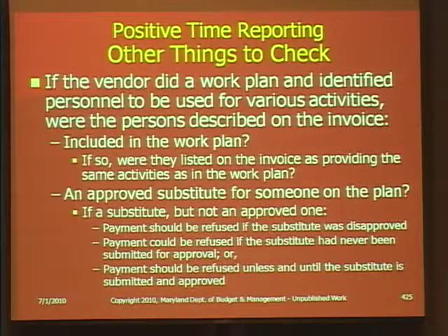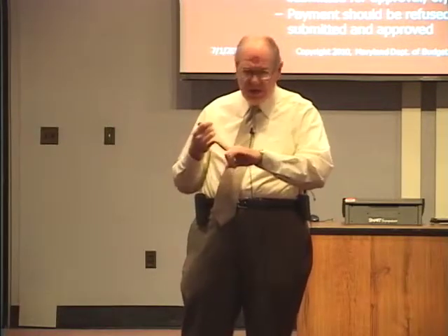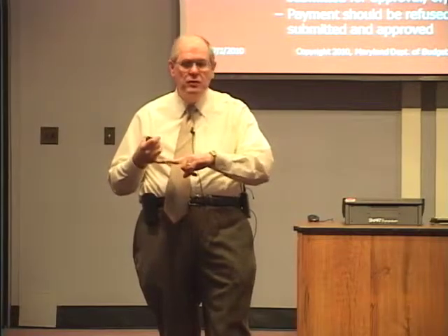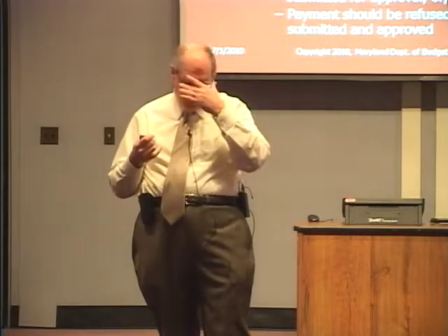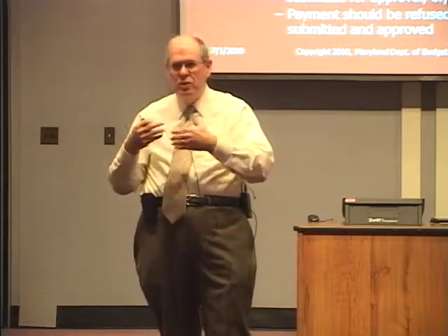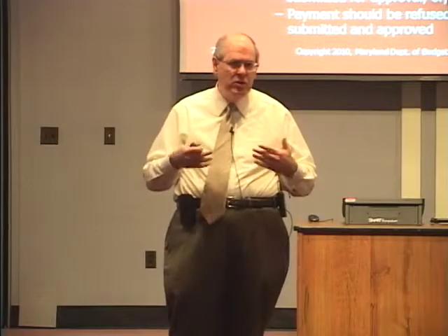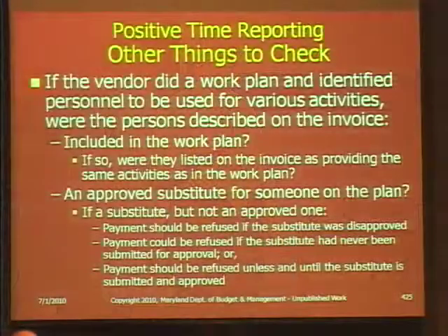Other things to check. So that is positive time recording. And you're not going to do that for every single contract. Number one, it's got to be time and material or time in some fashion. And then you have to determine whether what you're looking for is big enough to merit doing this, whether there's enough information you can glean, whether the contract's long enough to make it worthwhile. As I said, for everything, you have to decide when any of these techniques are appropriate and to what degree they're appropriate. Other things to check relative to time recording.